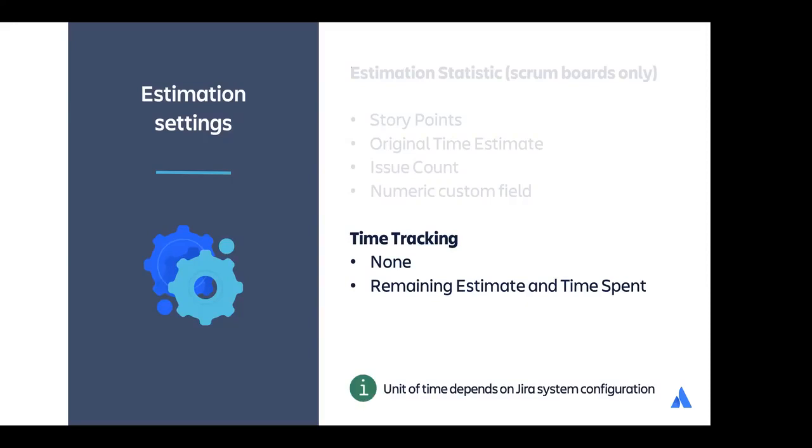The unit of time, by the way, when you use time tracking is by default in minutes. So if you were to enter a value like 5, say 5 is what I estimate, or 5 is what I logged, then by default in Jira it's minutes. But the Jira administrator can change that in global settings to be days, hours, or weeks. So if you enter 5, that could be days. You should be aware, but of course Jira shows you the format when it displays those time settings.